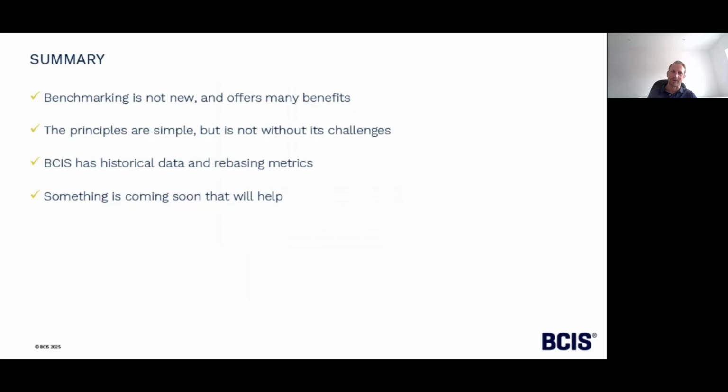Because what you're trying to do is convince perhaps a funder or an investor that this is the project to go with, and it's all going to go really well, and that's why we've got this optimism bias in there. It sets out a dangerous precedent that more likely the number that's been touted at the start is unlikely to be hit. Particularly if it's a publicly funded document, people will see that number, they'll remember that number, and that number will be the number they get hit with every time, because it's been an unrealistic starting point for the project. So it happens a lot, and it continues to happen.